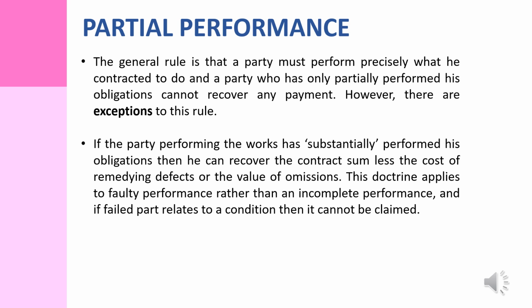Partial performance. The general rule is that a party must perform precisely what he contracted to do, and a party who has only partially performed his obligations cannot recover any payment. However, there are exceptions to this rule.